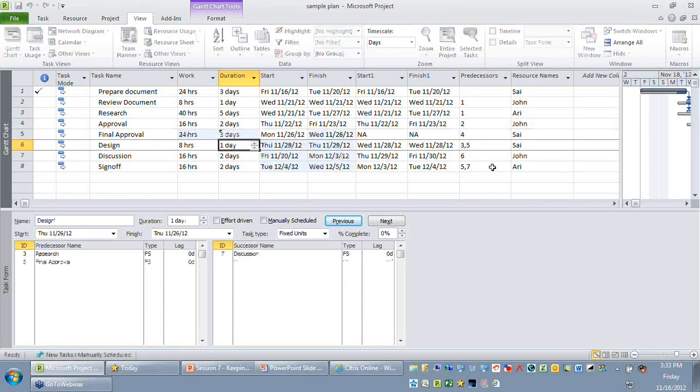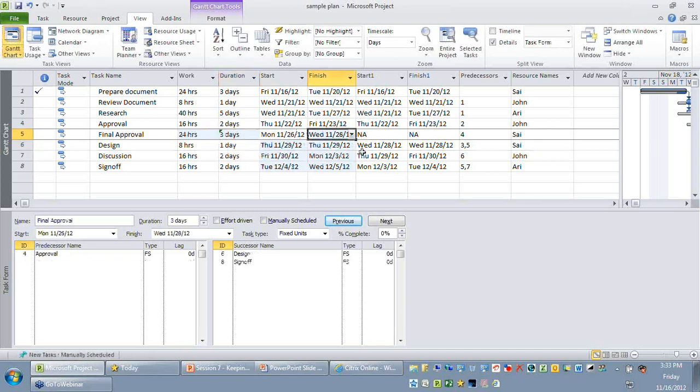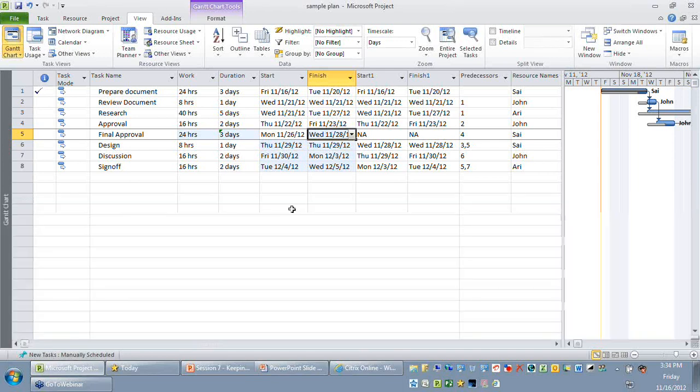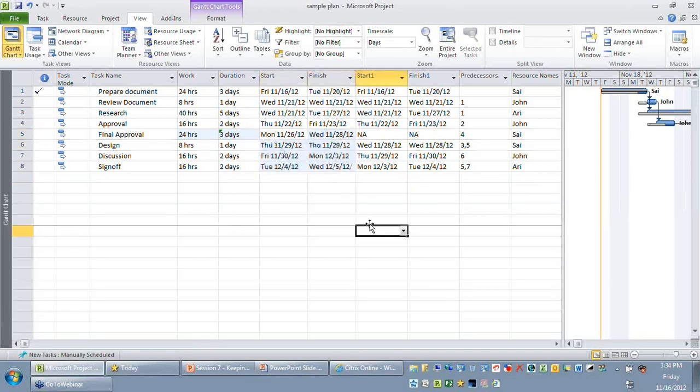So the moment you say 3 days, naturally the finish date of this activity got impacted, and you can see the successor activities or the activities that are linked to it, their start date and their finish date is also getting revised. Now, this is the impact the new activity has created in your current plan. So as you have already seen, doing the baselining for the entire project for an approved change request will not work. So you need to incrementally update your baselining.